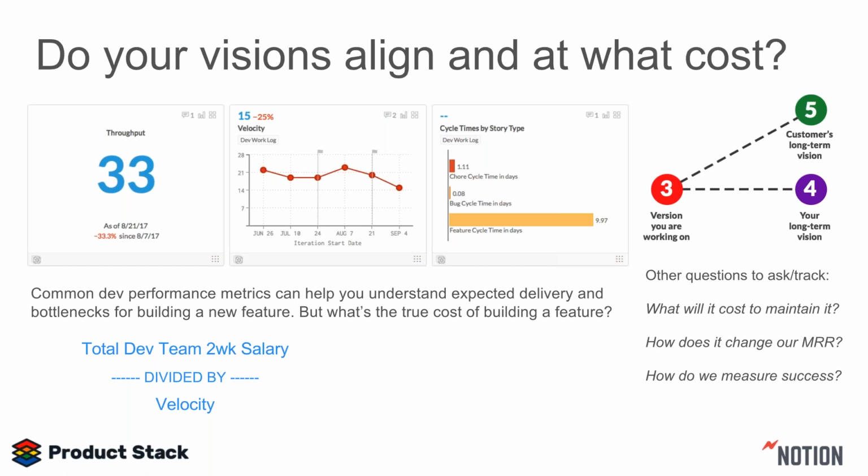And that's not a metric that should be used as a whip where you're trying to get it to be as low as possible. It should really be about pure transparency and decision making around, it's going to cost us X amount just to physically build this thing. Is that worth our time? Like if it's going to cost $10,000 to build, but we can only expect $3,000 in revenue from it, that should help you decide whether or not that's a great thing to build. So these are a couple metrics you can use to help align those visions.